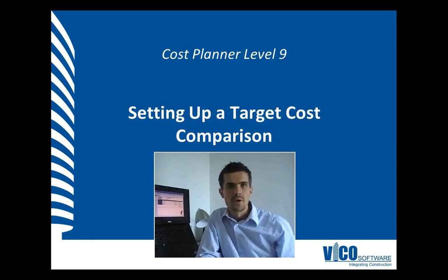In your meetings with owners and the management team, you're probably asked to present the current status of the cost as compared to the budget that was defined for the project. With Vico Office and the Vico Office Cost Planner, you can do this quickly by setting up the right set of columns and by using cost variance reports as well as the Cost Explorer. And this level is about that, about presenting the cost status to the owner or to the management team.